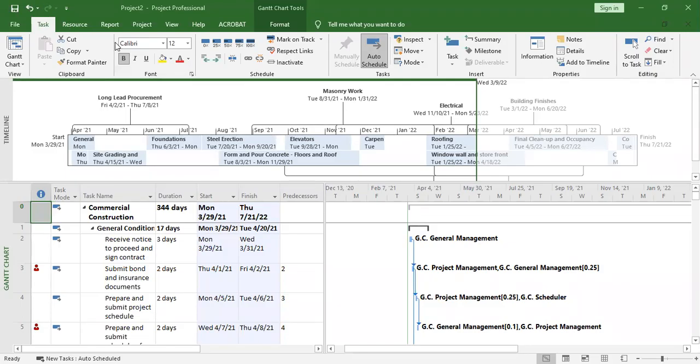Yeah, so we said if you want to track progress, confirm the schedule and be sure that this is the schedule that we're going to follow. Then after that, set it as a baseline. Then after setting it as a baseline, now you can start updating the whole project or marking the progress of different activities.